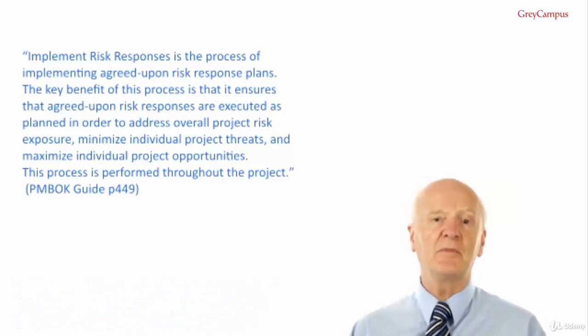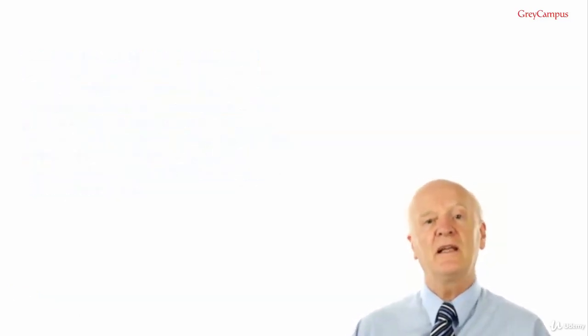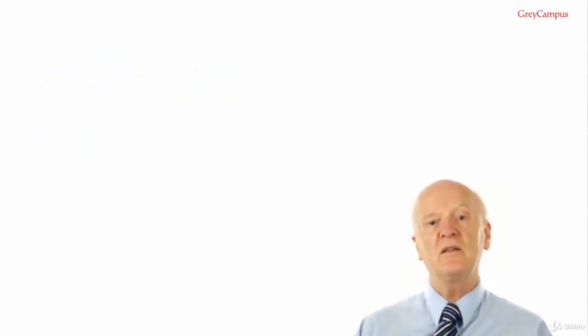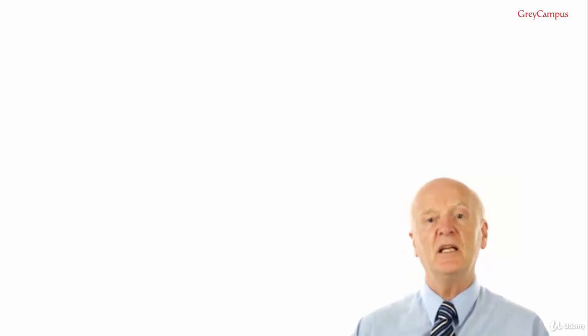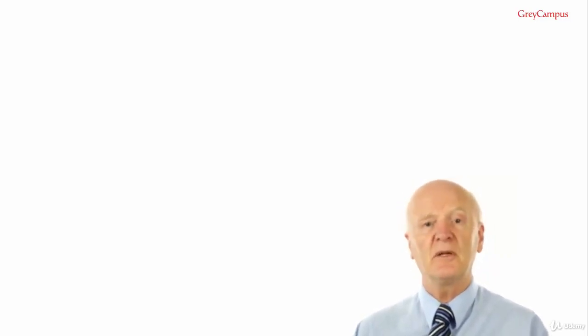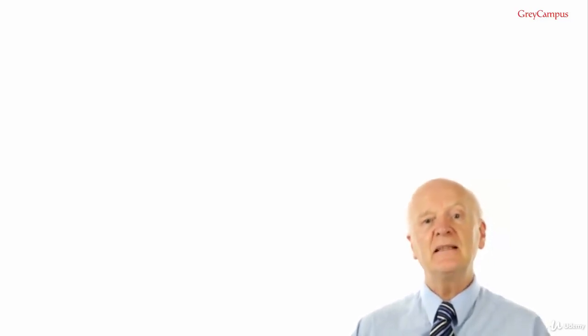How many times has this happened to your project? Be honest. You have got everyone together, identified and quantified risks, worked on the risk responses, developed an entire risk management plan, got it signed off, and then it goes into a drawer and is never seen again. The problem is that on many projects the project manager and team tick boxes without thinking any further about them. The risk management plan is of value only if you actually use it and keep it up to date, and that includes making sure that the agreed upon risk responses are actually executed by the risk owners.